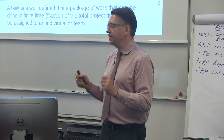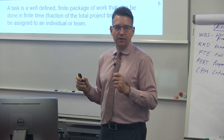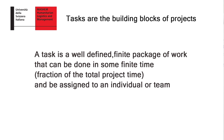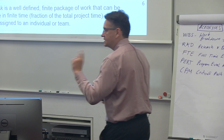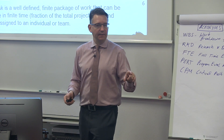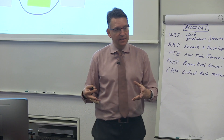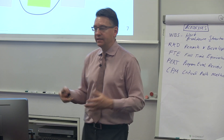To me, the fundamental building block of a project is the task or the activity. A task is a well-defined finite package of work that can be done in some finite time — a subset of the total project time — and it can be assigned to an individual or a team. The way this is formalized is in the WBS, the work breakdown structure.